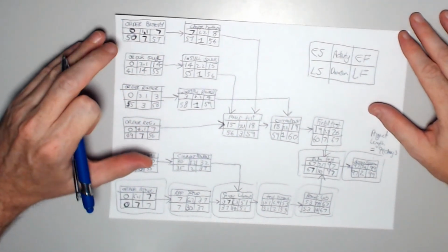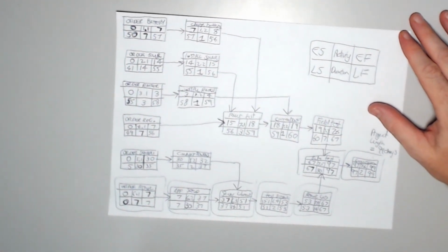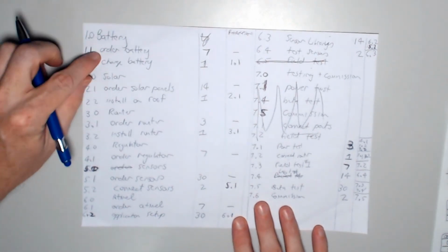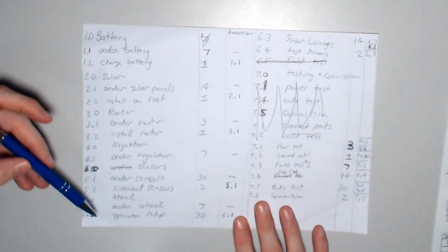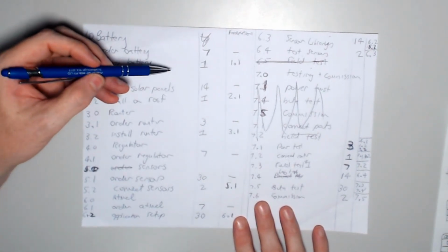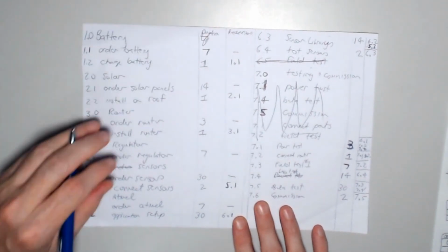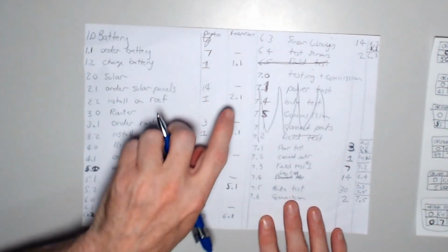So this is similar, or it's the same data that's used in a Gantt chart. And so when you create your Gantt chart, I've actually prepared this earlier. So this is the same thing. So here, I'm sorry, it's a little bit messy here, but these are the items that were on your work breakdown structure, so the same numbering. And here I put in the predecessors and the duration. So these are the durations. So these are taken straight from our other network diagram here, but then you can work out the predecessors.